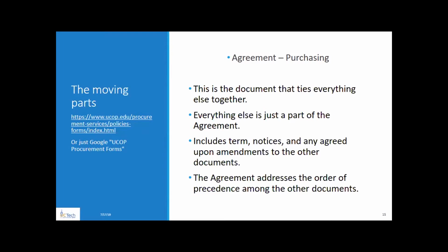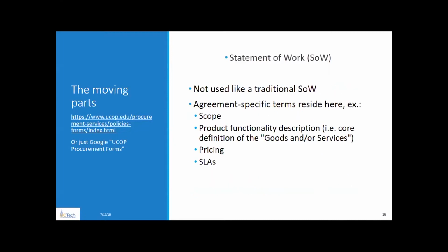It's a fairly high-level document. It's talking about dates and durations. It's talking about notices, and it's probably its main thing is when there are amendments or revisions or edits to the other documents, we capture them in this as sort of a cover document, right? And as well as stating the order of precedence in the whole package, right? So if 2 of the documents say something conflicting, right? Which one prevails, right?